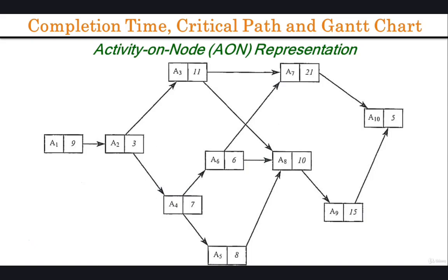The number of paths through the AON representation depends on the shape of the dependency matrix. In the easiest case, every activity would just have one information providing activity and one dependent activity. In such a project, the dependency matrix has just one entry per row and one entry per column. The duration of the project would be the sum of the activity times. Every time one activity provides information to multiple activities, the number of paths is increased.